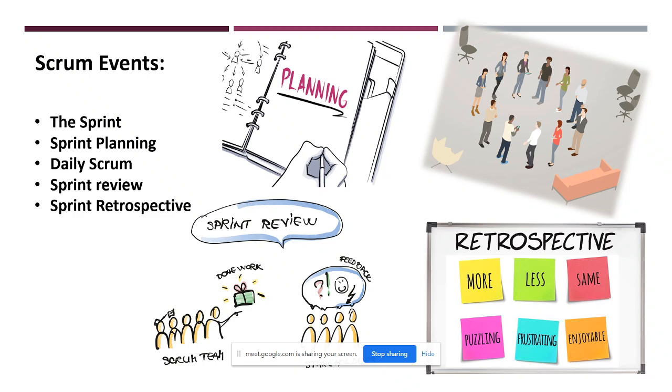So what exactly is a sprint in Scrum? A sprint is a time frame. Unlike the waterfall model, where we take the entire year to develop a project, in Agile Scrum we have a limited time frame. Maybe it's 2 weeks, or 3 weeks, or 4 weeks. Beyond that it cannot exceed for Agile.